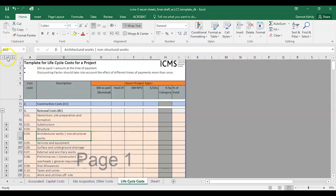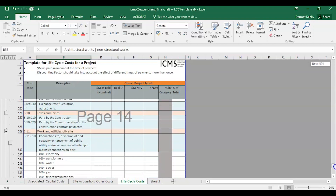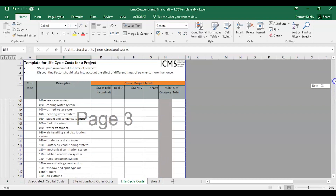To start with, I'll show all the levels of codes so you can get an idea. You'll notice there's a lot of breakdown structure when you include all the low-level codes. The positive thing is that once you've set up one line, you can copy and fill those formulas down to all the other lines — it's then just a matter of typing in your costs, like in a bill of quantities: quantity, unit, rate, and total cost.